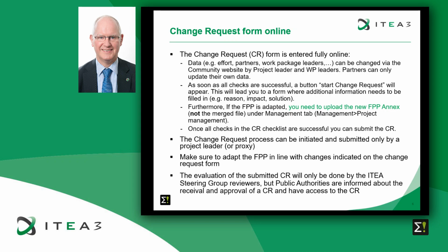Partners can only update their own data. As soon as all checks are successful, a button Start Change Request will appear. This will lead you to a form where additional information needs to be filled in, for instance, the reason, impact, solution. We come back to that later. Furthermore, if the FPP is adapted, you need to upload a new FPP annex. So don't use the merge file, but really use a new updated FPP annex file. And you should upload it under the Management tab.